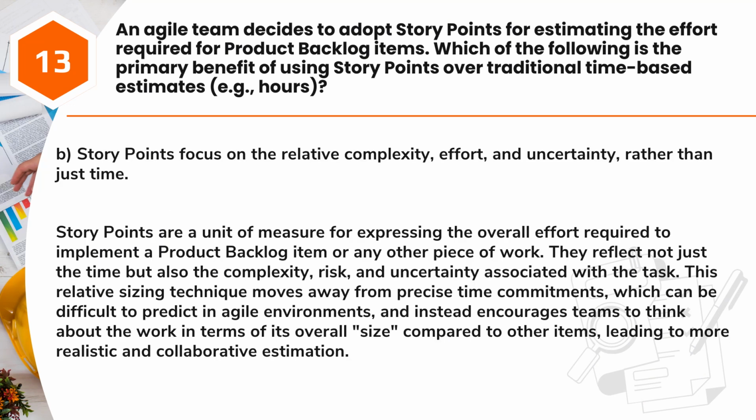Answer: B. Story points focus on the relative complexity, effort, and uncertainty rather than just time. Story points are a unit of measure for expressing the overall effort required to implement a product backlog item or any other piece of work. They reflect not just the time, but also the complexity, risk, and uncertainty associated with the task. This relative sizing technique moves away from precise time commitments, which can be difficult to predict in Agile environments, and instead encourages teams to think about the work in terms of its overall size compared to other items, leading to more realistic and collaborative estimation.